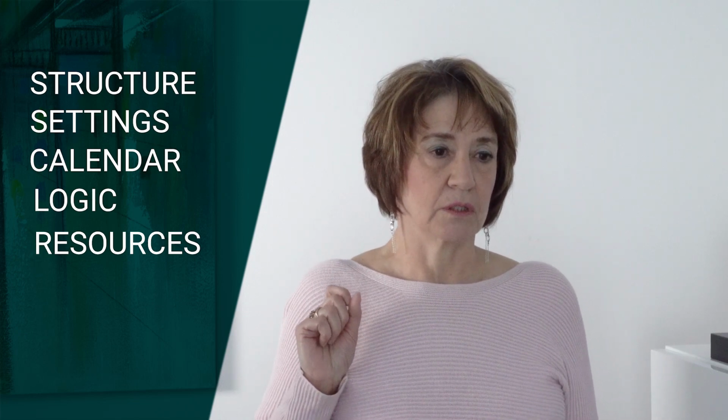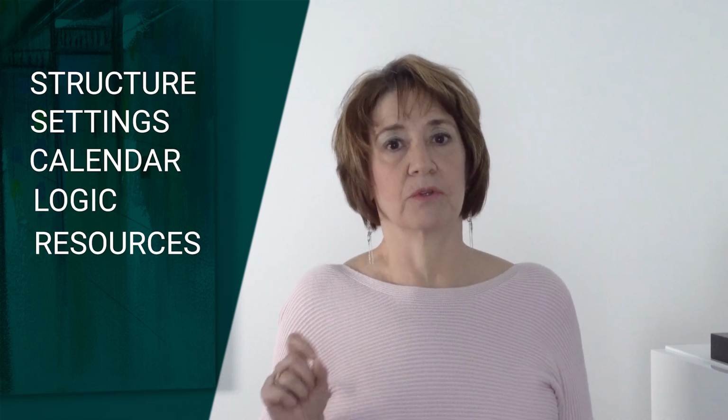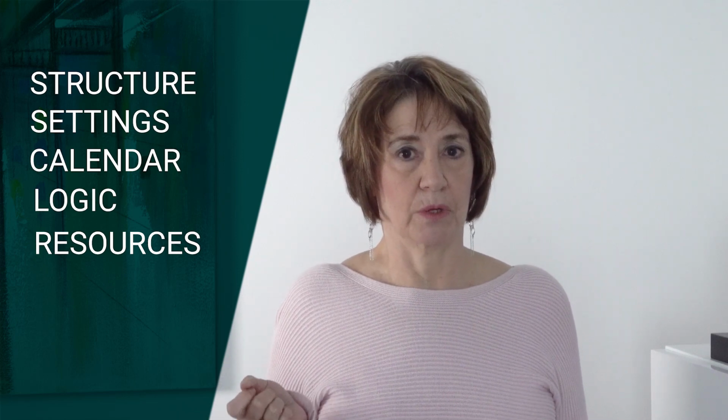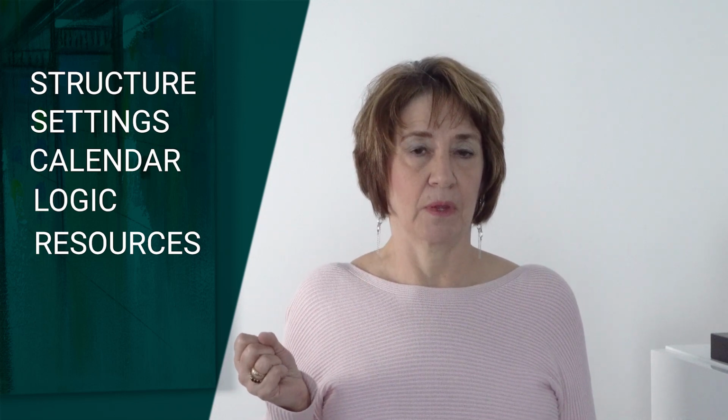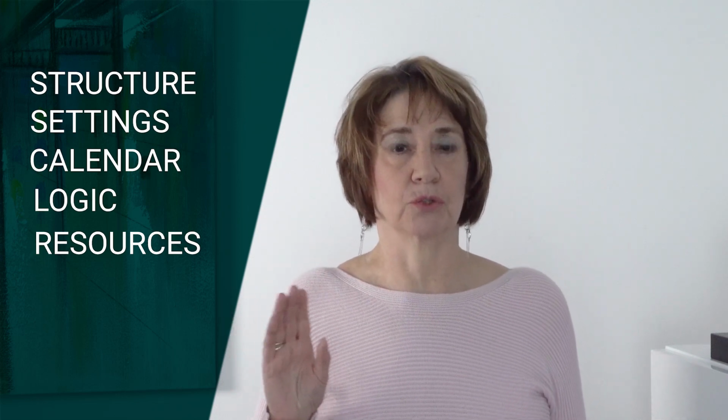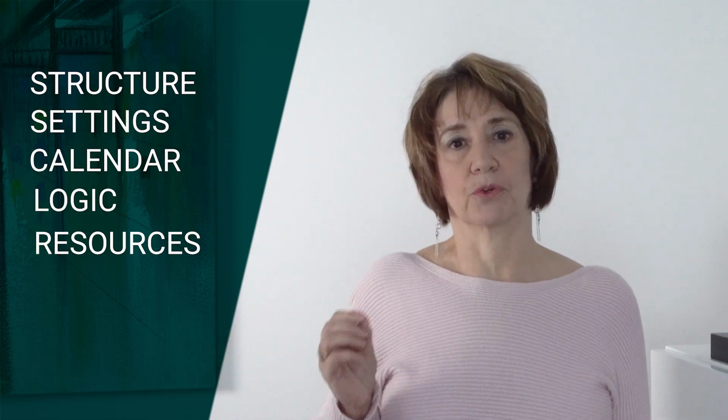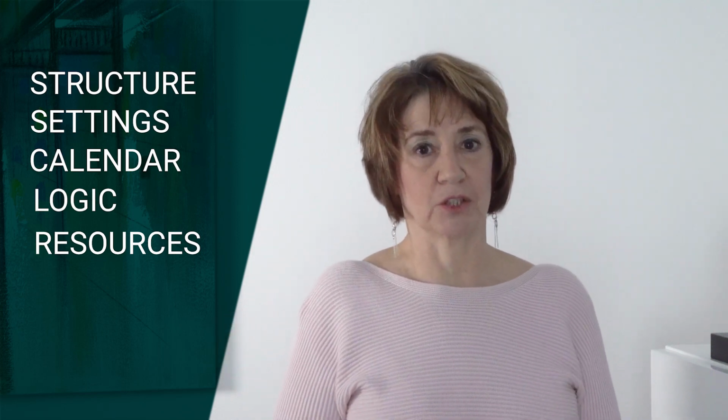Another thing that is not good practice is entering resources onto the summary. Enter them onto the activity. It's far easier to control the plan when you've got your resources on the activity that they're actually working on.